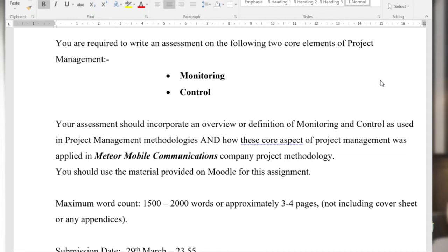So between what we already have agreed that has passed toll gate 1 plus any exemptions, that's the total picture of toll gate 1. So we know exactly where we are, so we can proceed into the next phase, which might be the design phase or the planning phase. And then we look at the criteria again. Have we done all that's expected of us at the end of the planning phase, and then go into the implementation phase, and so on and so on. That's all that's in there now.